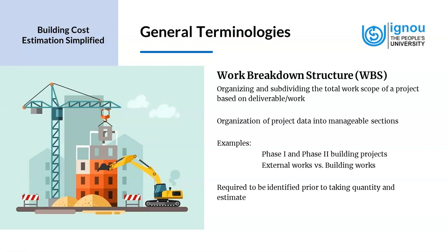Because sometimes we might be doing phase 1 now and phase 2 later on, maybe 6 months or 1 year later. And so this will have a cost implication on the procurement. It will have a cost implication on the storage of material, and it can also help in optimizing the labor on site, etc. So this has to be kept in mind while we are taking the quantity and the estimate right in the beginning.